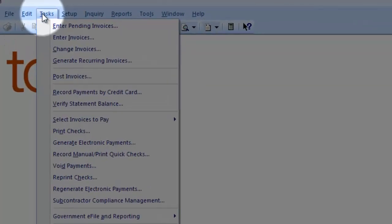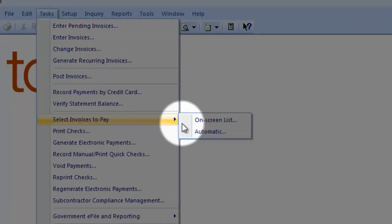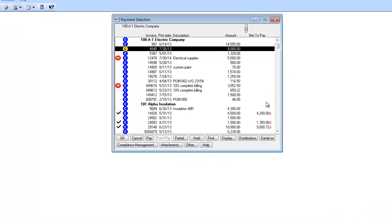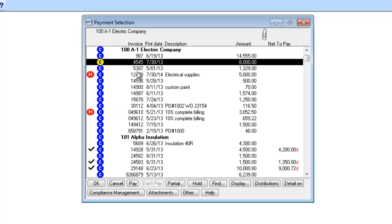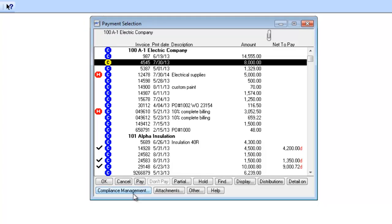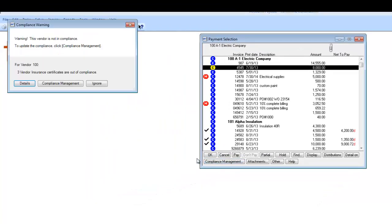Now I want to select this vendor for payment. As you can see, the blue C's here are notifying me that there is some sort of compliance issue with this invoice and this vendor. So before I pay this vendor, I might want to find out what the issue is. I can do so by opening the Compliance Management window directly from the payment screen. And it's telling me that they have three insurance certificates that are out of compliance.